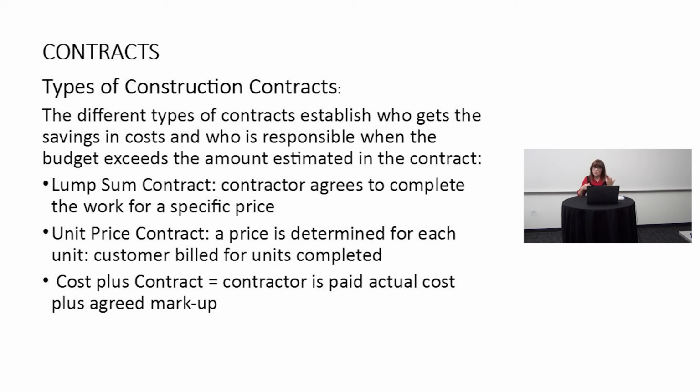Now, also, maybe we thought it was going to be a 5-day job, but it turned out to be a 3-day job. Now we don't owe any give back for the 2 days that we gained. So we take responsibility for both the overages and we win with performing ahead of our estimate.